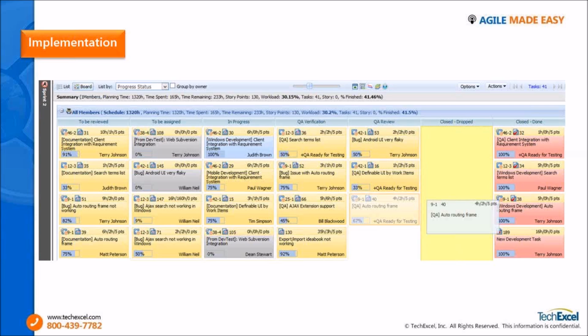So from this single view, both developers and QA are working, and in every daily meeting we make sure that the features the developers had committed to on that specific day or the previous day are implemented and have moved to either the QA state or the done state. If not, we discuss what the reason was and if there are any roadblocks, and we resolve those roadblocks so that the team can keep moving forward in the sprint cycle.